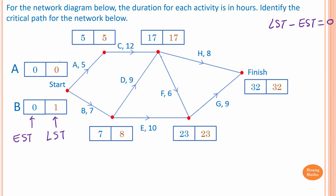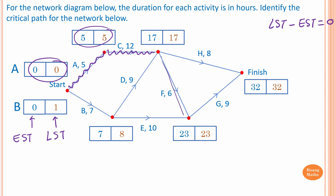Zero minus zero is zero, and five minus five is zero, so activity A is critical. For activity C, 17 minus 17 is zero, so activity C is critical. For activity F, to find the latest starting time we calculate 32 minus 8, which gives 24, not 17 — so that path is not correct.